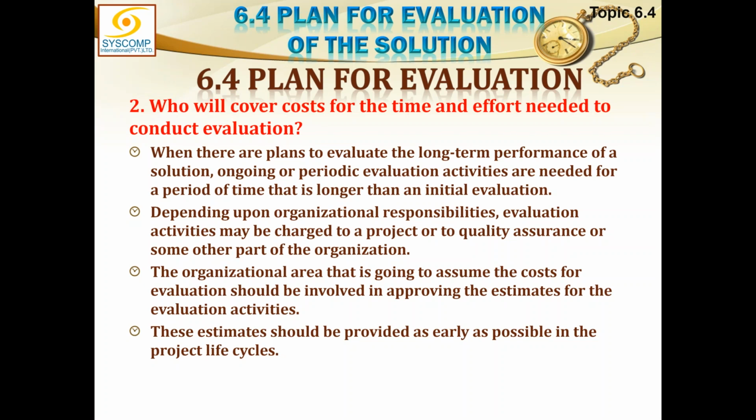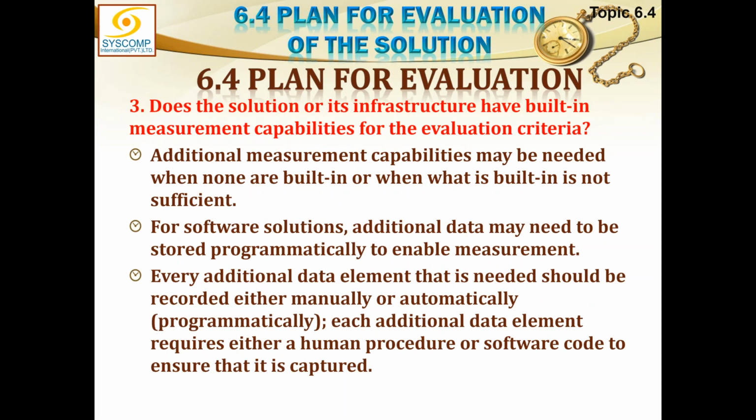The organizational area that is going to assume the cost for evaluation should be involved in approving the estimates for the evaluation activities. These estimates should be provided as early as possible in the project lifecycle, so that the funds can be available for that.